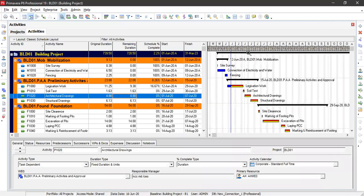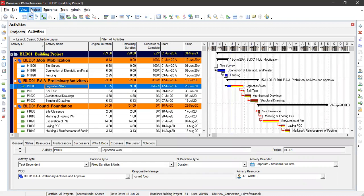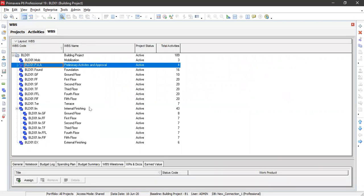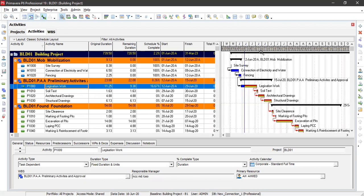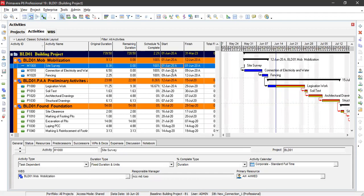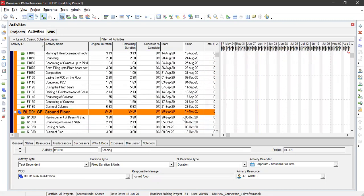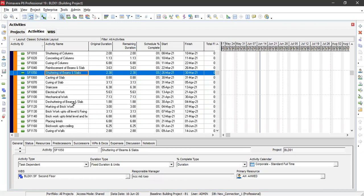The Gantt chart or bar area displays the planning. Whatever work is involved in the project, we add it here. When you look at the WBS — Work Breakdown Structure — you can see how the project is divided into different stages and activities, with time durations. You can also see the progress: the left part of a bar is actual work completed and the right part is remaining work. This is how we make a project plan in Primavera software.